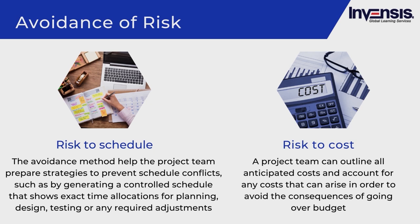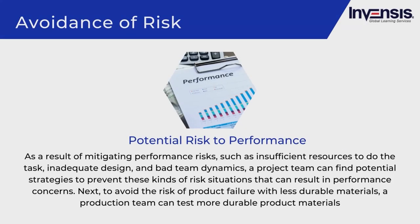Avoidance of cost risk means outlining all anticipated costs and accounting for any costs that can arise to avoid going over budget. For performance risk, by mitigating risks such as insufficient resources, preliminary design issues, and bad team dynamics, a project team can find strategies to prevent performance concerns. For example, testing more durable product materials can avoid product failure, and interactive team management can be employed to prevent team difficulties.